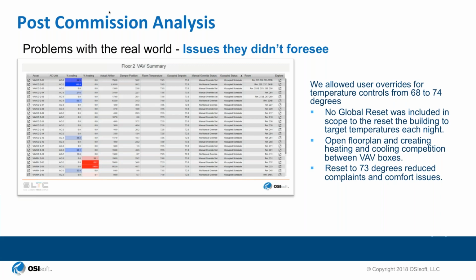So by just looking at the data and then challenging the data, we're able to start understanding post-commissioning issues that were never thought of in the process of putting it together. Because there is a disconnect between the design, the owner's initial intent, and the commissioning engineer who's sitting in a room somewhere remoting in and trying to commission a system. It doesn't all get documented. So there are definitely gaps in that process and system. Next slide.